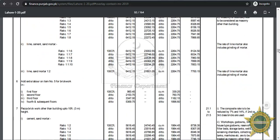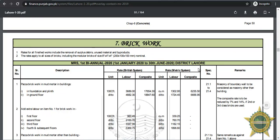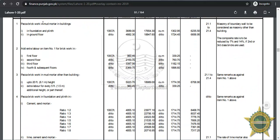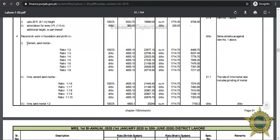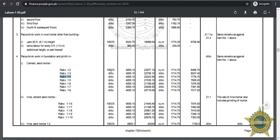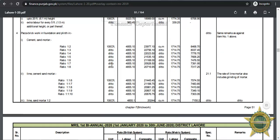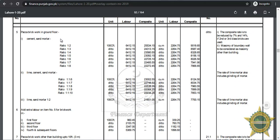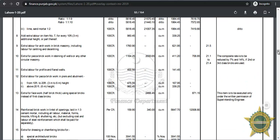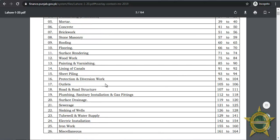Going to page 51, this is the chapter of brickwork and rates of finished works include removal of surplus. Let's say we are interested in paka brickwork in cement sand mortar — not mud mortar. For paka brickwork in foundation and plinth, cement sand mortar at ratio 1:4, 100 CFT will cost this much in labor and this much in composite charges. Similarly, for ground floor, cement sand mortar ratio 1:4, those are the rates. All types of activities including lime and cement sand mortar are available here.